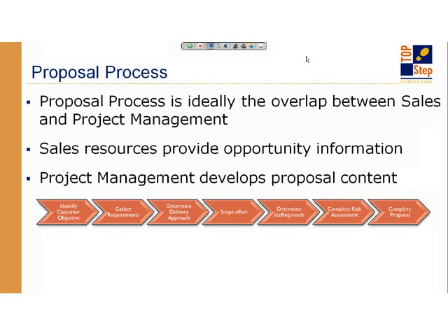Once the delivery approach and the requirements are done, then you've got enough information to start scoping what the effort is going to be and what the project is going to be looking like. Identifying the types of resources you need, the staffing needs. Resource management is always a big impact within organizations, and the sooner you can get a feel for how many or what kind of people you need in some guesstimate time frame is always a benefit to be able to manage your resources and team.